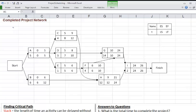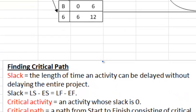Here is a neater version of the project network we just created. So the next thing we're going to do is, we're going to find the slacks for all the activities, and using the slacks, we're going to find the critical path in the network. So that's the definition of the slack. It's basically the delay that you're allowed to have for an activity. It's the length of time an activity can be delayed without delaying the entire project. So it's just going to be the latest start time minus the earliest start time, or latest finish minus earliest finish. It doesn't matter which difference you get, it's going to be the same. It's basically the bottom number minus the top number.